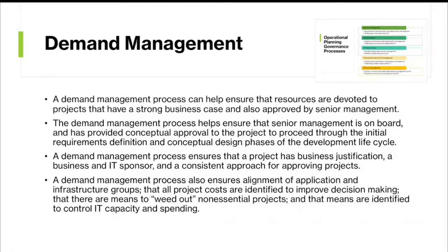A demand management process can help ensure that resources are devoted to projects that have a strong business case and are also approved by the senior management. It helps ensure that senior management is on board and has provided conceptual approval for the project to proceed through the initial requirements definition and conceptual design phases of the development life cycle.